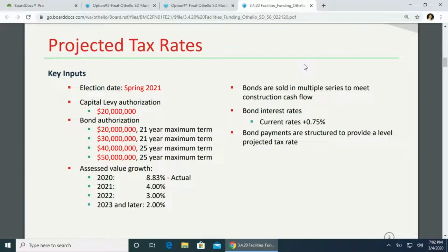Yeah, pretty serious thing. But the more detailed of a schedule and the more detailed of a cash flow model, because you also have to show everything from projected interest earnings in it and your revenue stream of your state dollars coming back to you, so you see that whole cycle through the completion of the project. With that, you can be pretty strategic about when and how you break it up and structure it.